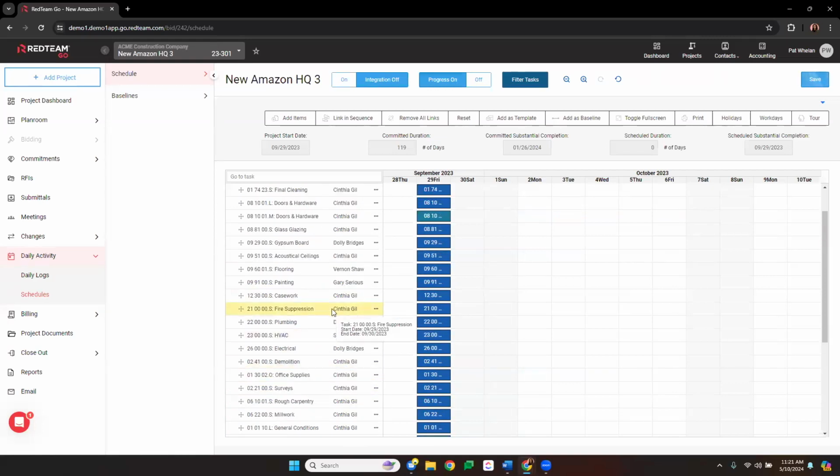For example, items that have my name as a general contractor have not yet been subcontracted out. Things that have other people's names, like the subcontractor project manager, you can see were subcontracted out and someone else is responsible for those items. The vendor portal has the ability to show the subcontractors the schedule, so they can always be up to date on the schedule.